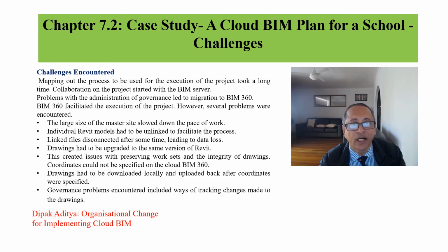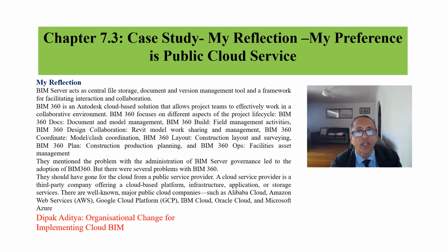However, they encountered challenges. They initially used BIM Server, but the problems with governance led them to migrate to BIM 360. Still, there were problems as the large size of the master site slowed down, had to unlink Revit models to facilitate progress, disconnect linked files, drawings had to be upgraded or downloaded locally, and governance problem with the tracking changes. My reflection on the case study is that they should have gone for public cloud services.